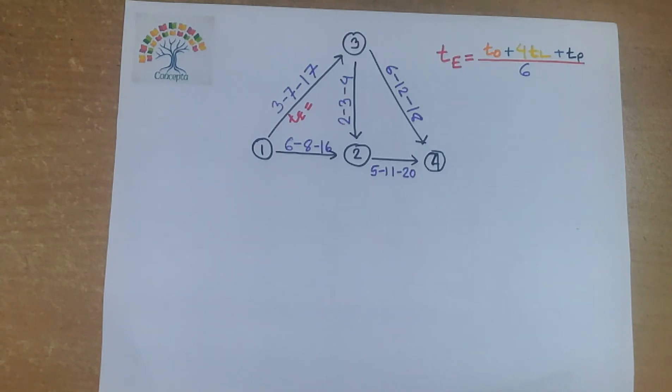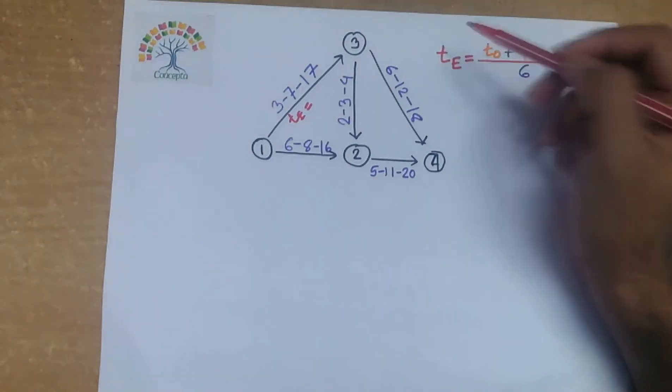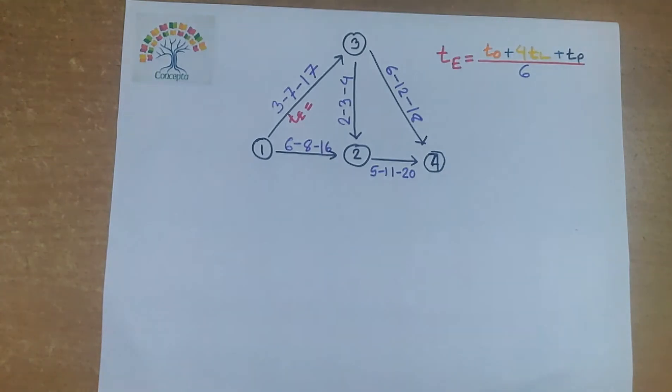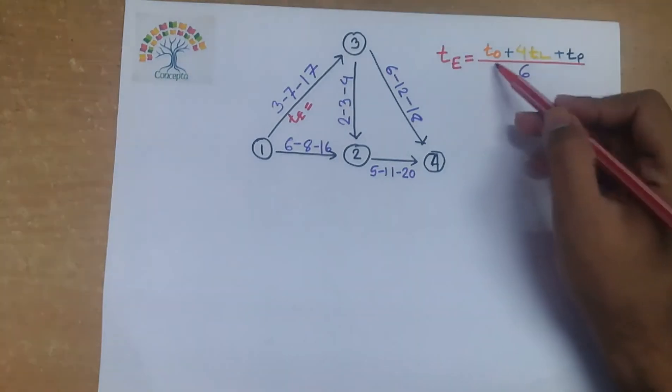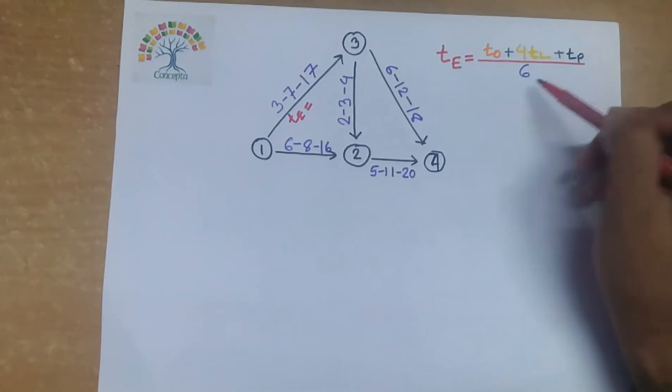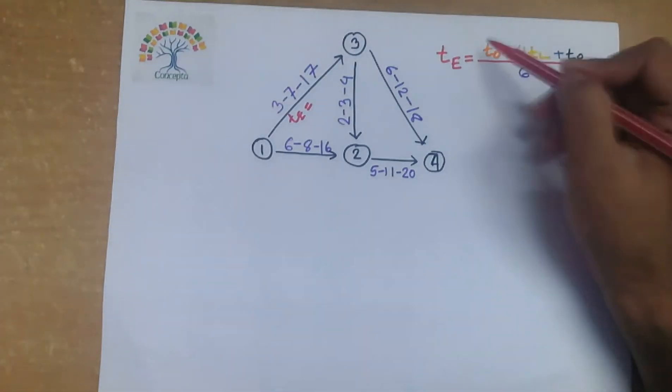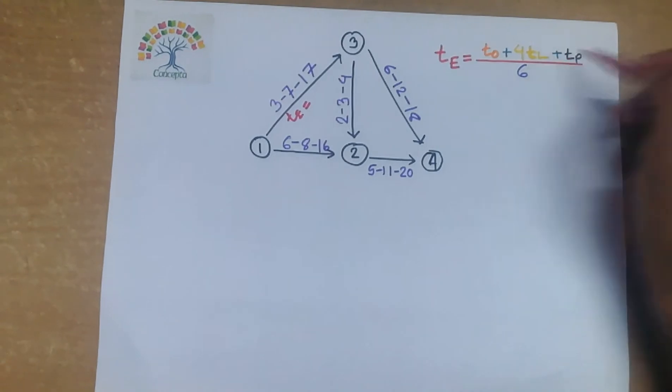the tricks using these three types of time. So for this purpose, an individual representative time is introduced which is expected time te. te is a weighted average and the formula is te equals to t0 plus 4tl plus tp by 6, where t0 is optimistic time, tl is the most likely time, tp is the pessimistic time.